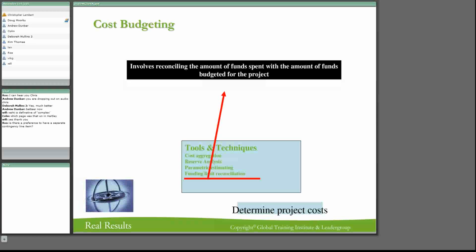you've won the contract to do tiling within a new hotel that's got 1,000 rooms, all right? Now your parametric estimating is going to say to you, well, it's going to cost me $1,000 per bathroom, and therefore I can do it 1,000 times over, all right? So that's parametric. So we've worked out one, and then there's another one.